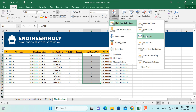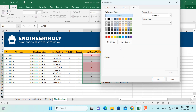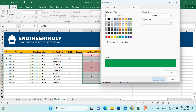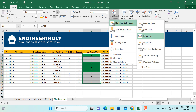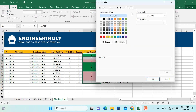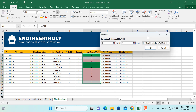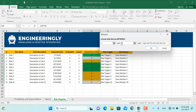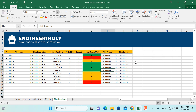I'll go to Conditional Formatting, Highlight Cells Rules, Between. If the value is between 0 and 3, it should be green — I'll go to Custom Format and select a green color, then click OK. Again, with the area still selected, go to Conditional Formatting, Highlight Cells Rules, Between. If the value is between 4 and 6, it should be yellow — go to Custom Format, select yellow, and click OK. Once more, go to Conditional Formatting: if the value is between 7 and 9, it should be red — select a red color in Custom Format and click OK. Your risks are now color coded.